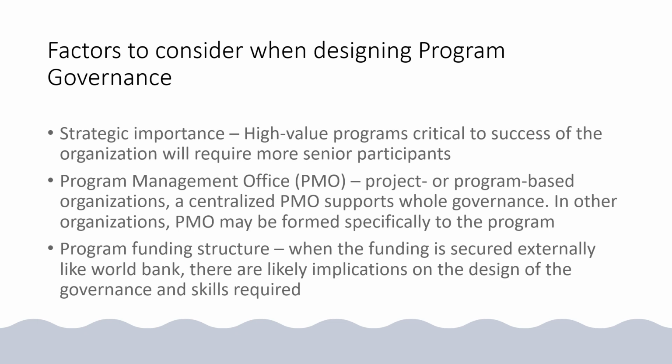Another factor is the program management office, right? In a project or program based organization, a centralized PMO supports the whole governance, right? If the organization is very small, a PMO may be formed specifically for the program, or you can have the program management team handle PMO activities as well. It depends on the size of the organization. You can design your governance accordingly.